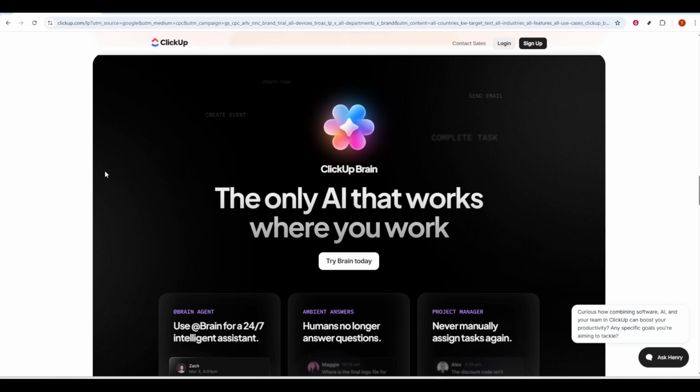Finally, plan your automations and AI usage with intention. In ClickUp, start by automating status changes, recurring check-ins, and routine summaries. Then layer in AI agents for copy or documentation where it saves real time. In Zoho, map automations that cut across apps, such as creating a project when a deal moves to a certain stage, or triggering approvals when budgets change, so Zia can support the flow end to end. Keep your first iteration simple, gather feedback, and refine.